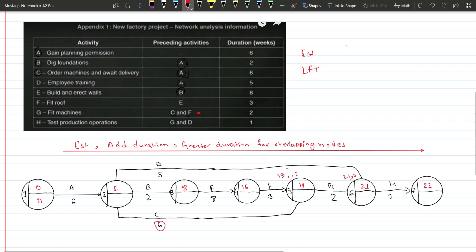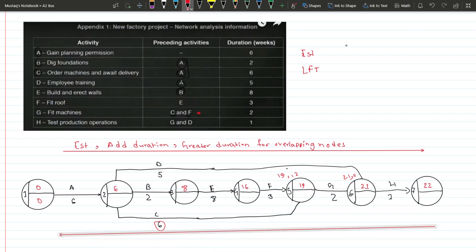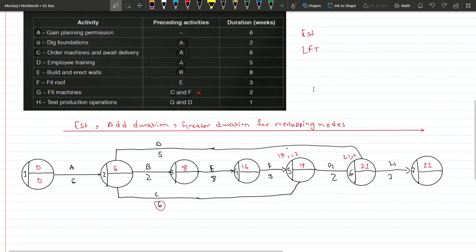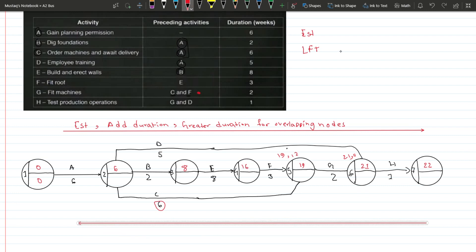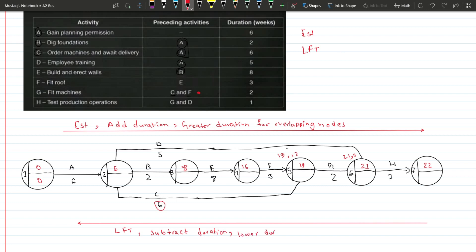Adding the last activity gives us twenty-two. We're done with EST calculations. For LFT it's the opposite of EST — we go from right to left, subtract the duration, and take the lower number for overlapping nodes.